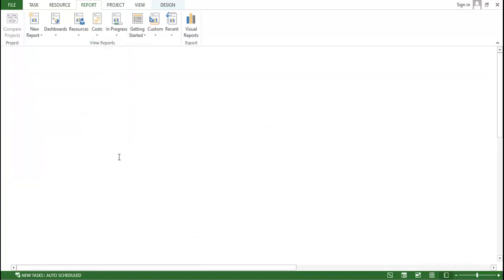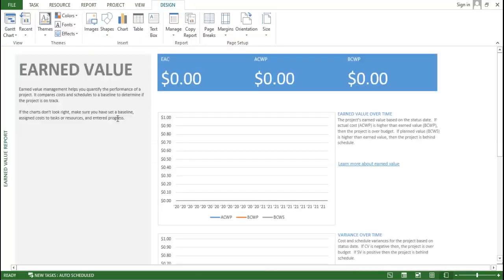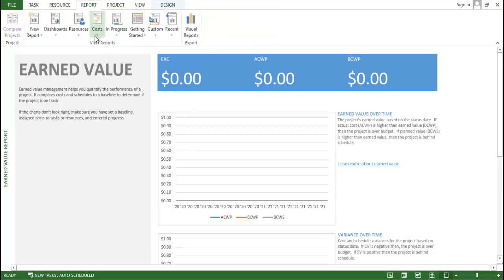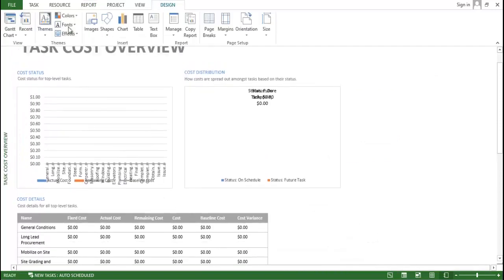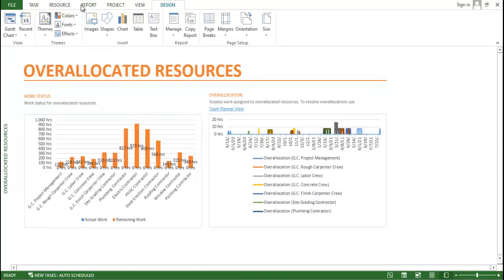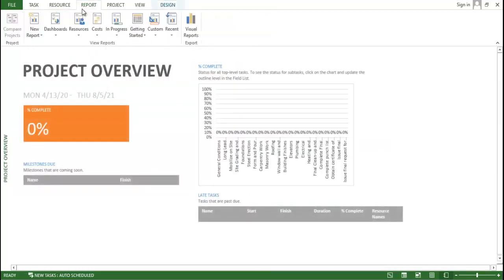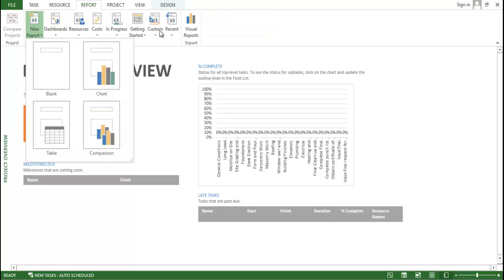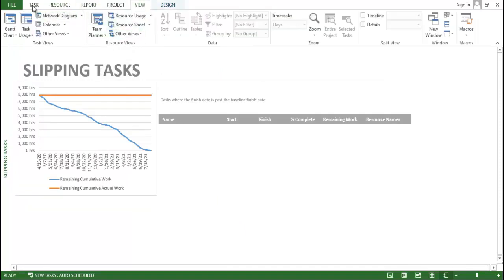Reports include critical task details with percentage work, cost overrun showing how much extra cost is running on the project, and the Earned Value report covering estimate to complete, actual variance, budgeted cost, and budgeted variance. There is also a task total cost overview, an allocated resources view, a project overview dashboard showing percentages, and a slippage task report.